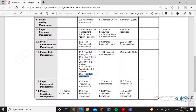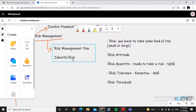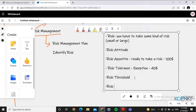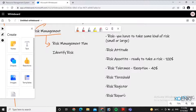After the plan, you implement the risk responses — you can call them risk response plans. When talking about risk appetite and risk threshold, you need to find out the risk. If you are unable to find the risk, how will you use all these things? When you identify the risk, you put that information into a risk register or risk report — these are the two formats.